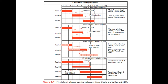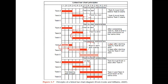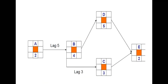In software view, you can see finish-to-start relationships shown by arrows from the end of one task to the start of another. A start-to-start relationship is shown with an arrow from the beginning of one activity. An overlapping relationship can be represented as a start-to-start with a lag — for example, two days after starting task A, task B can start — shown either as an overlap or as SS+2 days. These relationship types are explored in Problem Set 1.